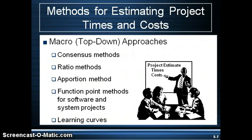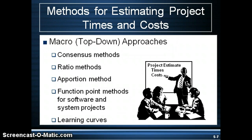There are different methods for estimating project times and costs. Starting with the top-down approach, first is the consensus method, which utilizes a pool of experienced senior management or expert judgment to estimate project durations and costs. This is where the Delphi technique may be used. The Delphi technique gathers input from experts individually so that participants don't know who the others are and therefore won't be influenced by others' opinions — this prevents something called groupthink.